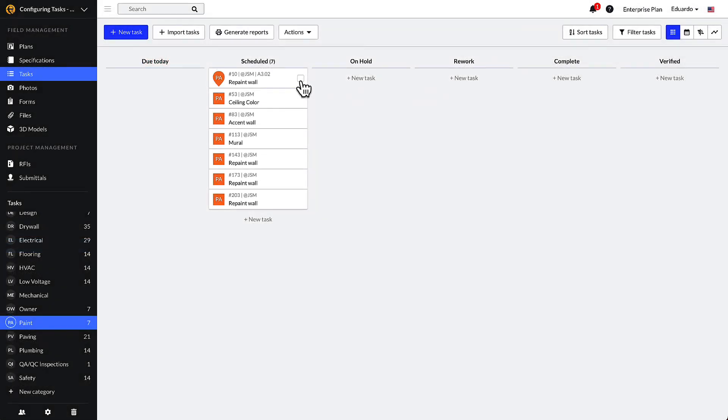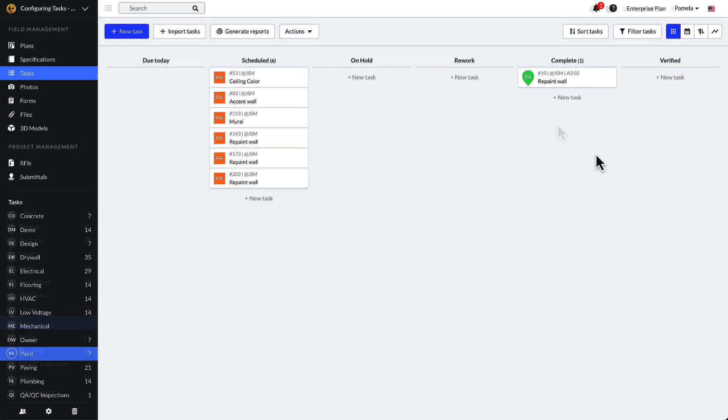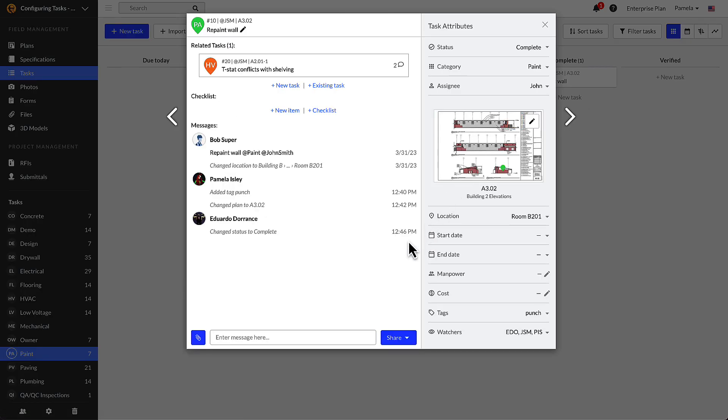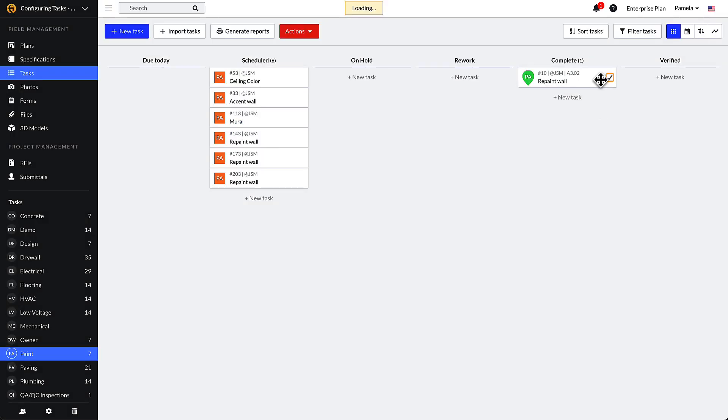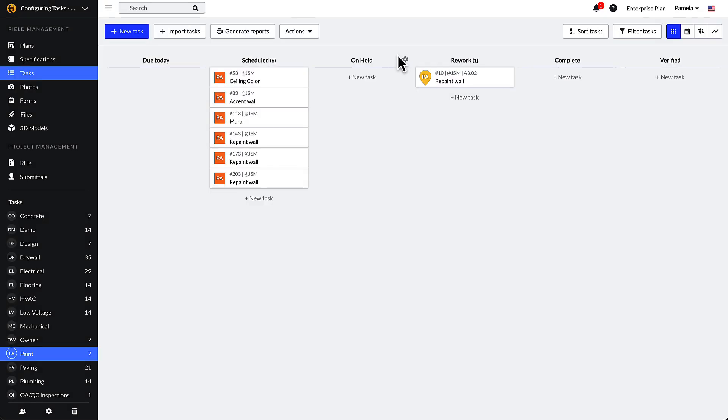Let's say my foreman has just moved this paint task to completed because he finished painting the north wall. Now my architect wants me to repaint it. I can move the paint task from the tracked completed status to the open rework status. Therefore, tasks do not have to follow a linear workflow, but the status columns will follow the open, tracked, to verified workflow from left to right.